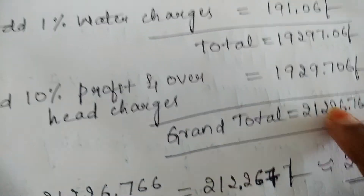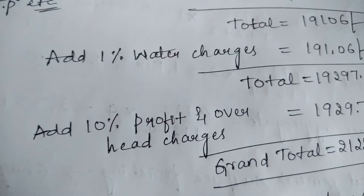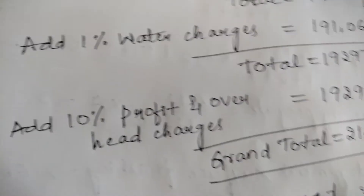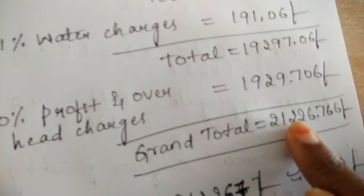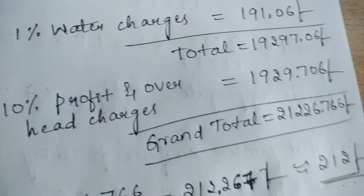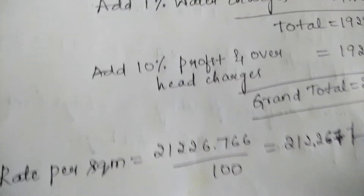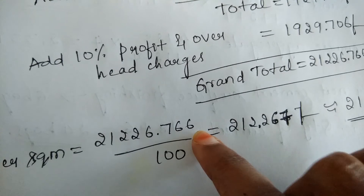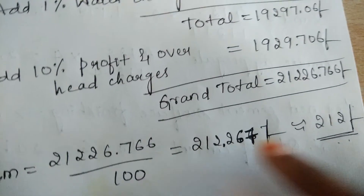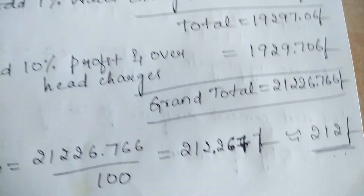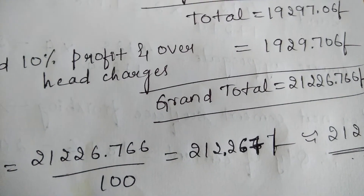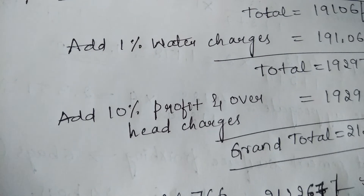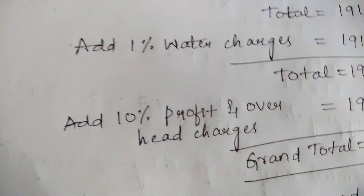This grand total represents the final amount for cement concrete flooring of 2.5 cm thickness including cement smooth finishing for an area of 100 m². The amount is for 100 m² of area. If we want to find the amount for 1 m², the rate per square meter is found by dividing 21,226.766 by 100, giving 212.267 — approximately ₹212 per m². So this completes the rate analysis for cement concrete flooring of 2.5 cm thick including smooth finish.